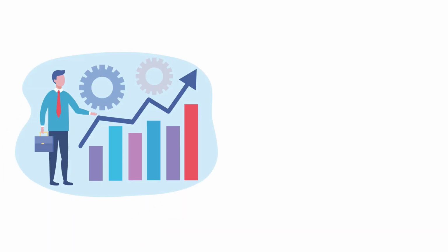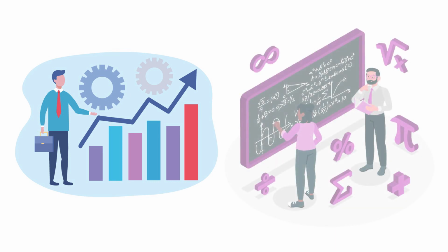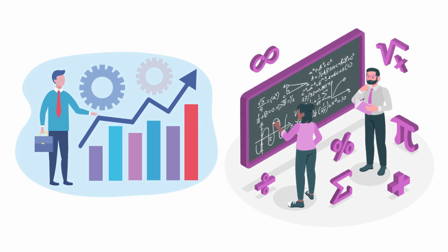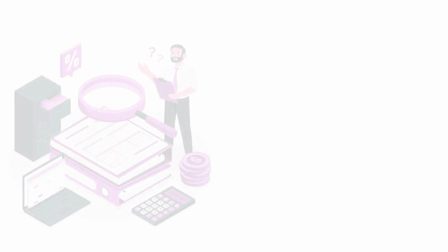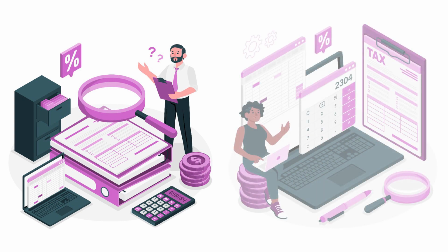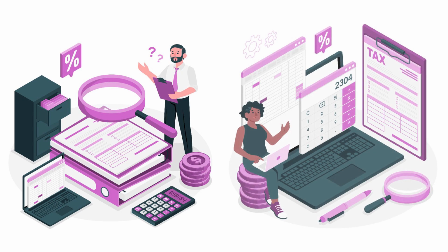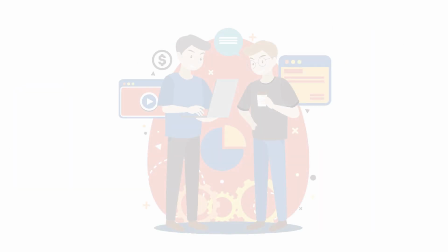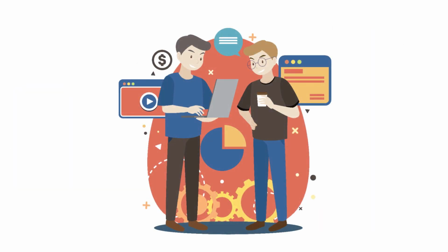For example, parametric estimation necessitates a statistical correlation and subsequent calculation. 3-point estimates rely on 3 different estimates and a mathematical formula. On the other hand, expert judgment and analogous estimating are performed without using mathematical calculations. No matter which estimation technique you use, it is essential to create the document called Basis of Estimates to set out the assumptions and constraints and estimate ranges while making estimations. Now we will discuss each tool in detail.